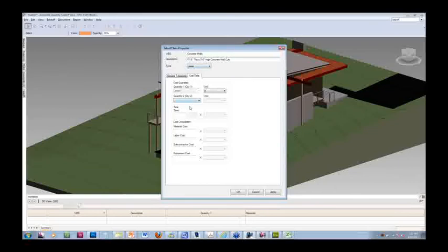So pretty much here, you can then add information about the material costs, whether by the length or by quantity, labor costs, subcontractor costs, equipment costs if needed, and you can do not only a length calculation but maybe also add area if needed. And you can add time to it as well. So all these things you do once, and you build that catalog, which is something that you can do from an Excel spreadsheet as a starting point. So it'll save even more time. Maybe the one thing that you need to assign is just these values.